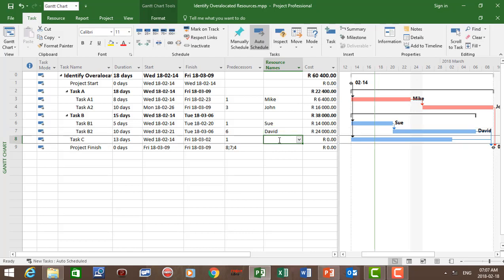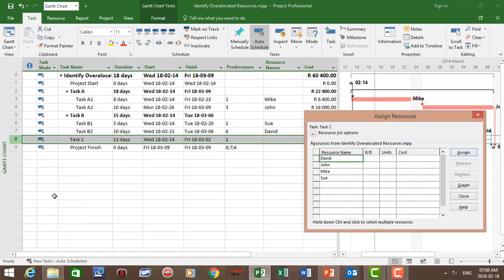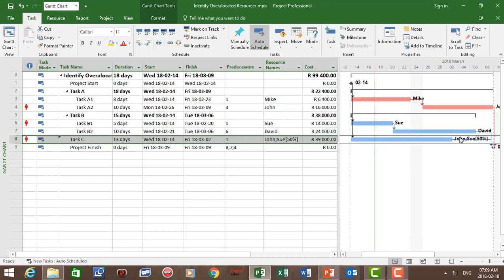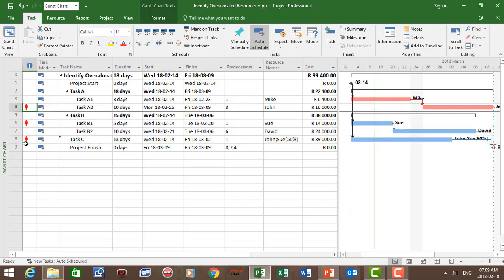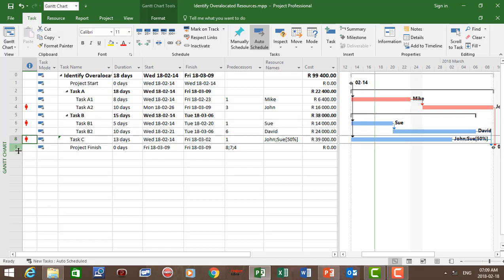For task C we're going to assign two resources. Let's right-click on task C and select assign resources. Now let's assign John 100% and Sue 50%. We can see John is assigned 100% and Sue 50%. In the indicator column you can see that task A2, task B1, and task C are over-allocated.